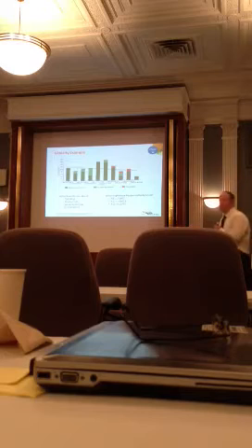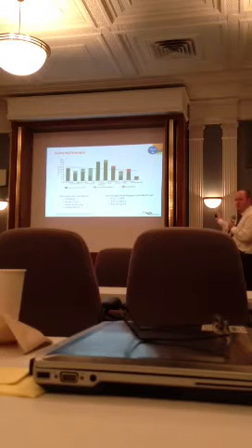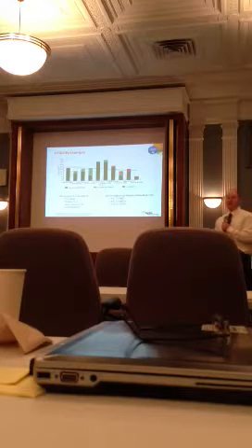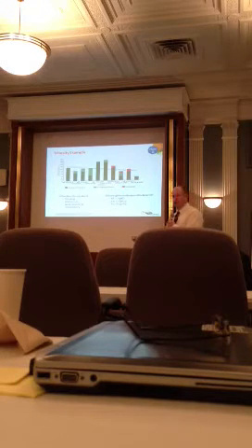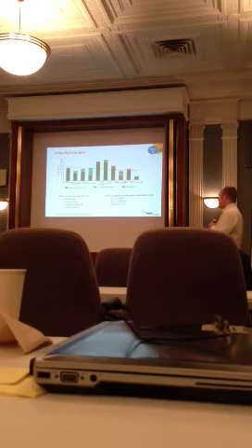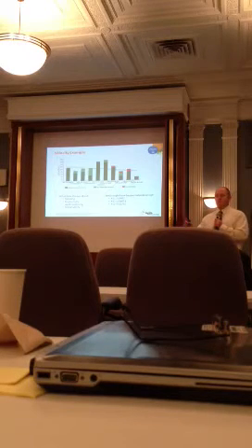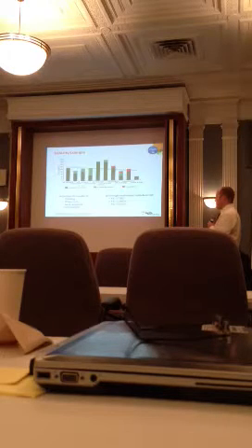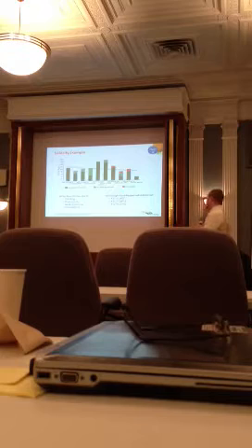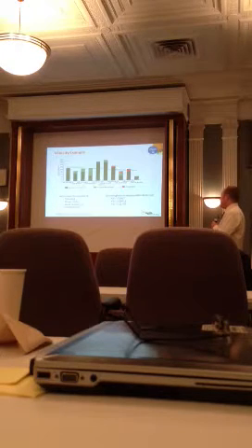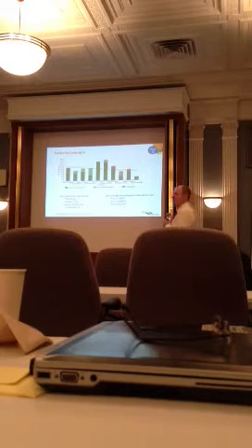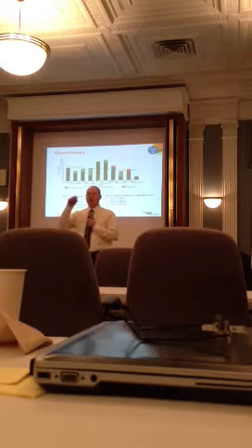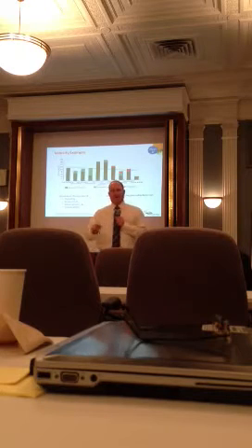All right, so let's explain first of all what this graph is, just the information in it. So on the y-axis here, you have your velocity, your number of story points you're delivering. On the x-axis, each one of these bars represent one iteration. Okay? So in this iteration, my team delivered roughly 110 story points. Okay? The dark green means you committed to the user story in that iteration, and you got acceptance of that user story in that iteration.